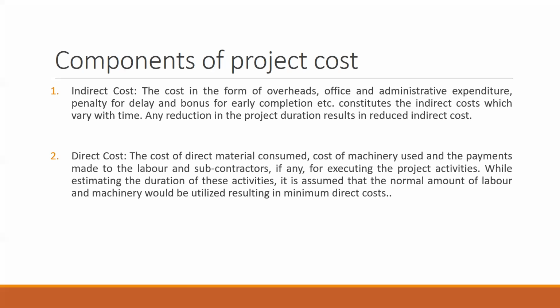Okay, going ahead. If you look at the different types of cost there, especially your indirect cost and your direct cost together, there is always a relationship between the time duration and the cost. If you search on the net, you'll find a graph. If I plot a graph of time versus cost, you'll get a different type of curve. Especially with time, the cost might go down initially, and as you go forward, it might increase. So we need to find the exact position or the time at which my cost is less and my duration is also less.